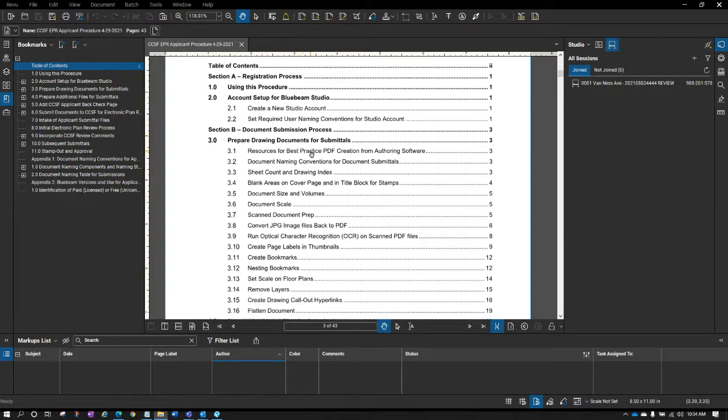If you are signing these documents, signing these drawings, putting your name on these, we don't want you to use any digital signatures, because through our workflow process, the digital signatures basically provide too much restrictions within the document that you sign, and that causes problems for us on our end. So number 1, no digital signatures.